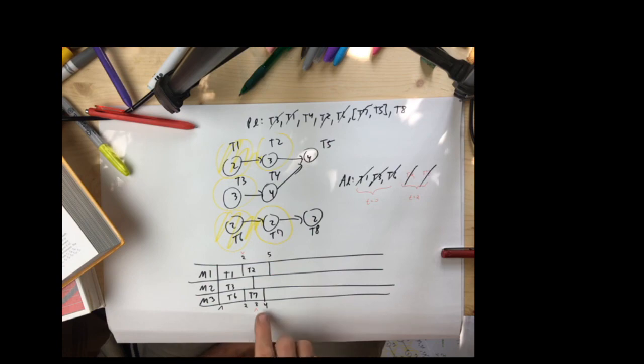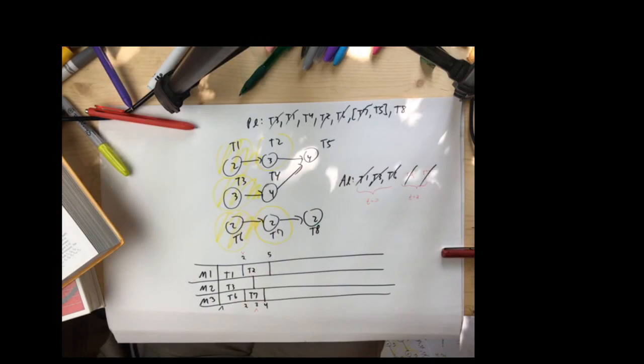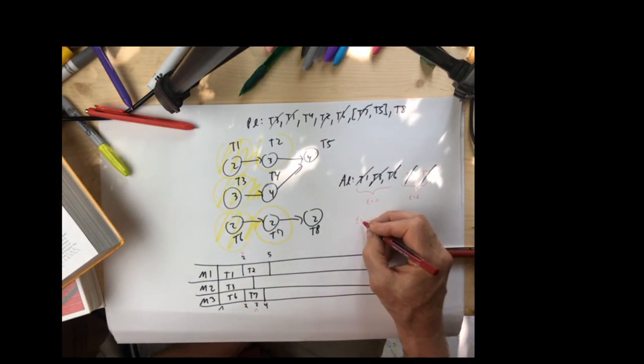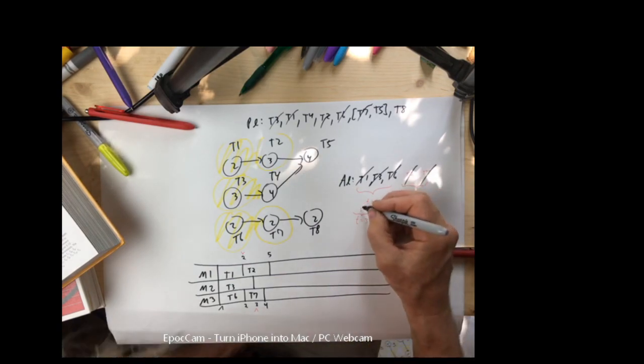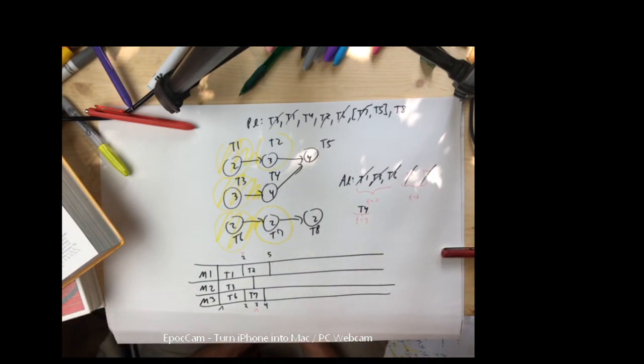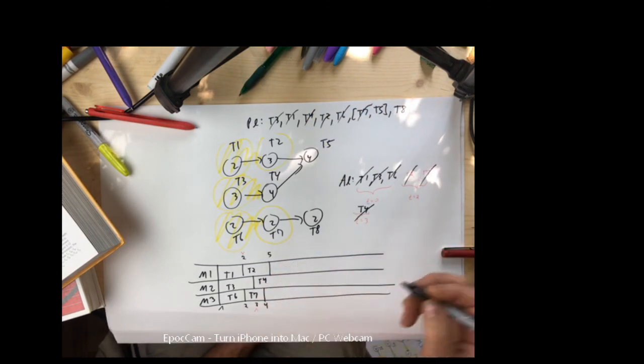What happens at time equals 3? Machine 2 woke up the boss because T3 just finished. Now when T3 finishes at time equals 3, T4 becomes available. That's it. Looks like we're scheduling really efficiently. Things are going great. 1 person waiting for a job at time equals 3, 1 job available, we assign it. T4 runs for 4, we're going to be out at 7. We highlight this. Now this is great. 3 things. Everything's running just fine.